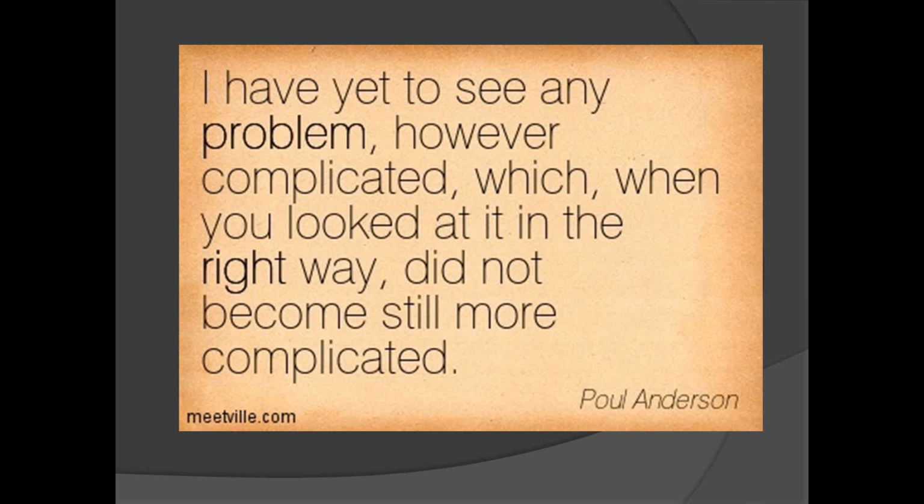And when we're talking about functions and features, we're talking about those needs and those wants and what it is. So you want to make sure that you deliver into 3 different groupings. When you break down and you talk to a customer, you tell them, what is it that you must have? What is it that you have to have now? What is the #1 desired outcome? So you want to prioritize what they want. What is desirable to have that might be based on getting to that point of what they must have. We might be able to hit upon these highly desirable things that they want.